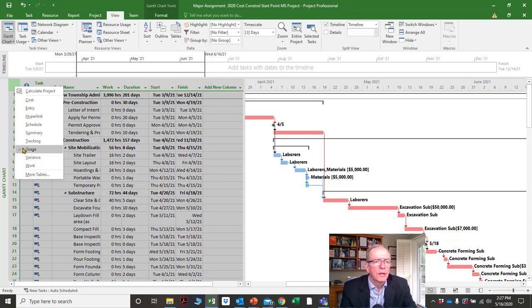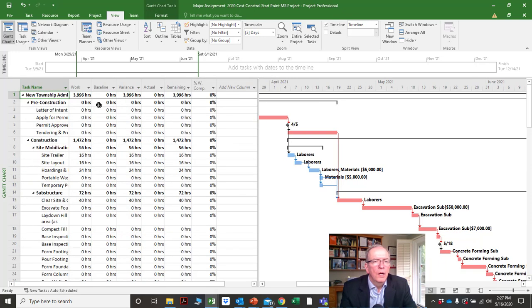We've got our work and what was our baseline — if we set the baseline, we'd have the hours. We'd see the variance not only in time frames but in hours of work.